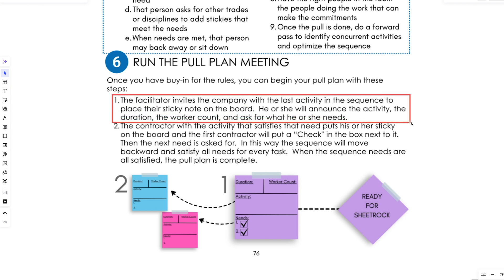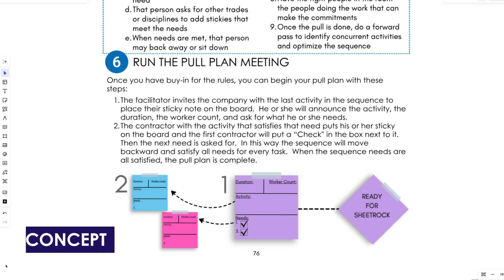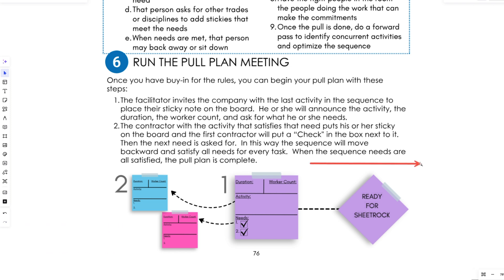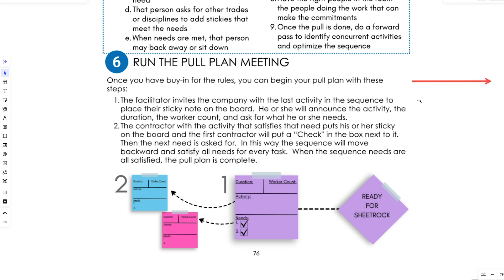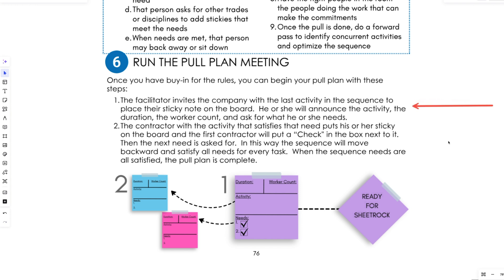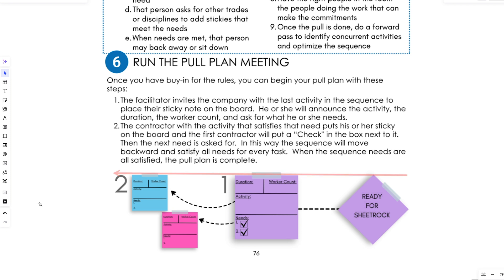Now for running the pull plan — my favorite part. The facilitator invites the company with the last activity to come up to the board. It doesn't matter if you go forward then back, or backwards then forward. The concept is: create the sequence that takes care of the job, but also make sure the trade partner's needs are covered. A pull plan is like a marriage — what the job needs and what the trade partner needs, working together.